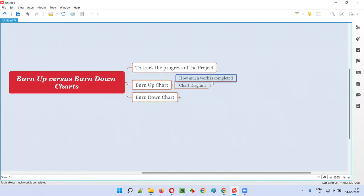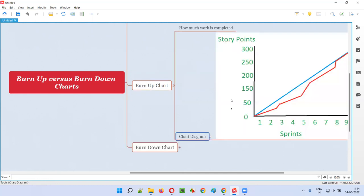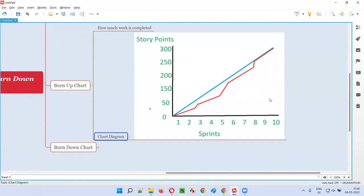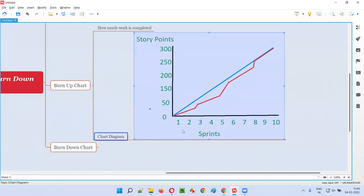In the case of the burn up chart, it shows how much work is completed. Here is the diagram for the burn up chart. On the left side we have the story points — the total story points for the software to be released. On the right side we have the number of iterations or sprints. Let's say we are planning to release the software after 10 iterations.